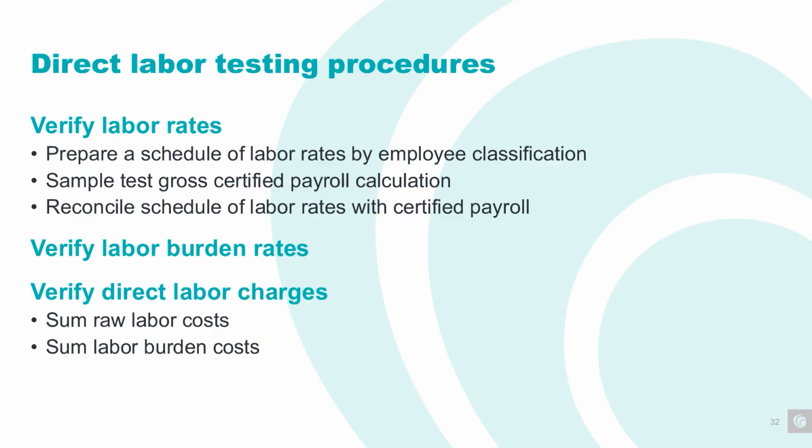After that, you want to cross-reference your labor rate schedule with the certified payroll itself. Every employee billed should appear in the certified payroll, and the rate should also align.